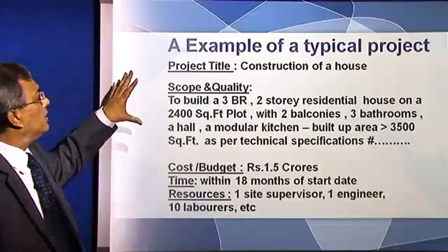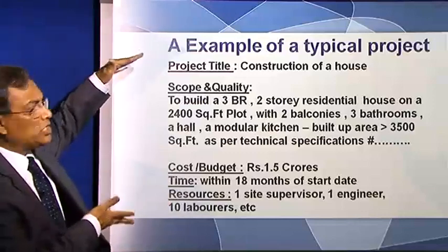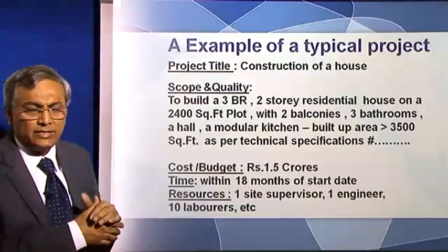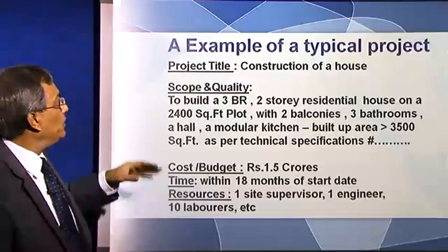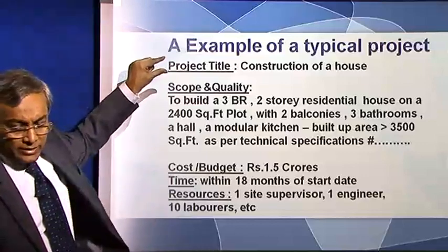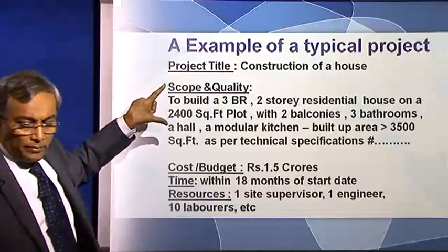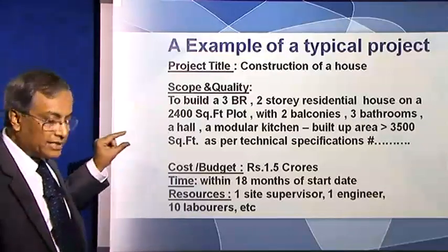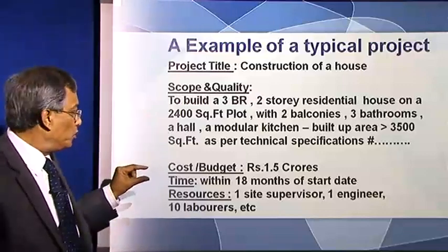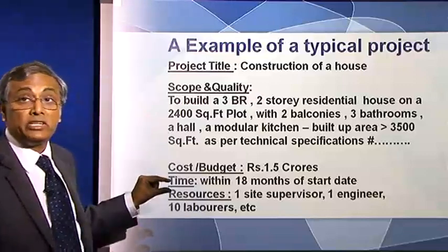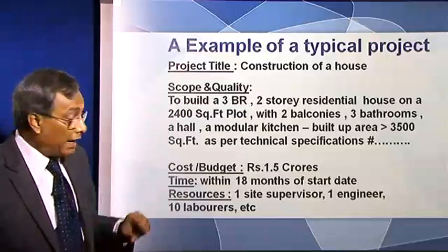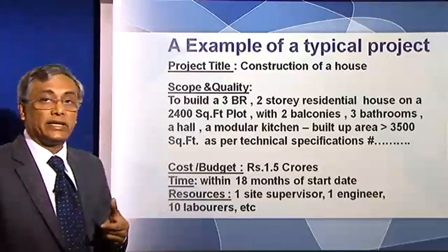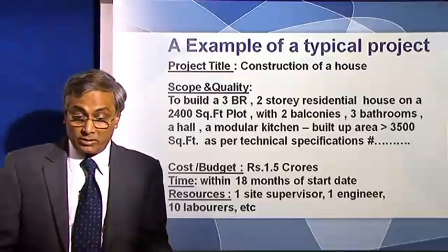So this is the way in which a typical project is constructed. This is known as the project charter, in which there is a title of the project, a certain scope and quality desired of the project, a certain budget that you have to conform to, a time within which the project has to be delivered, and finally certain resources that are available to you as a project manager.